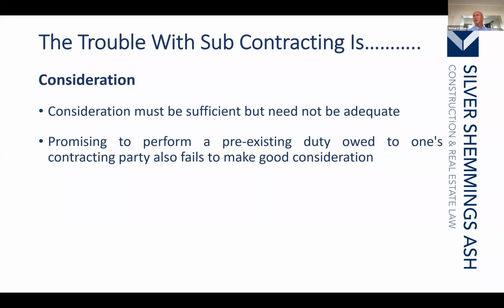There's a new contract in place, surely. You can now not recover the additional money. The answer is, it is unlikely that contract will be enforceable because there has been no consideration. The reason is that I've paid you £70 of an existing duty to pay £100. So there is no consideration for me. And as a consequence, that agreement would not be in place. There are exceptions, however, where I have paid you early. The fact I've paid you £70 today, rather than £100 in a week's time, I've provided you consideration. I have done something additional, and that's what we need to look at.